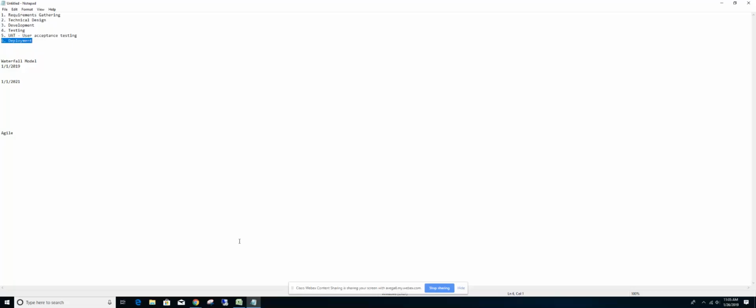Within the environments, there won't be only one test environment. There will be numerous test environments. Between one test environment and another, yes, deployments happen very frequently. Some people deploy every 15 minutes or every 1 hour between one test environment and another. But when I mean deployment here, I'm talking about the actual production deployment. Live deployment only happens after the QA team, the testing team, and the UAT team provide their approval.